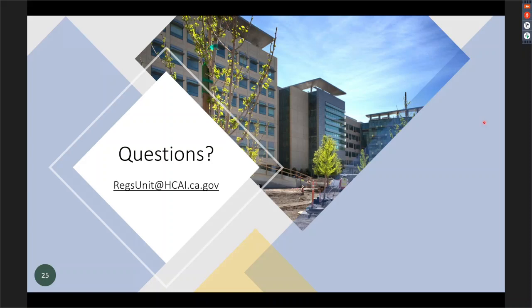All right, and I'm going through these questions here. Next question reads, for the purpose of numbering an NMA log, do we start with NMA number 1 for an RFI number 9, for example? Yes, please. We would ask that you start with the beginning, because again, we're tracking sequence for the NMAs. You may be on RFI 1000. We don't want to start with NMA 1000.